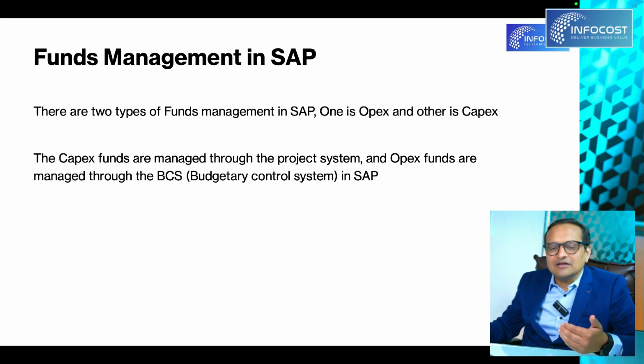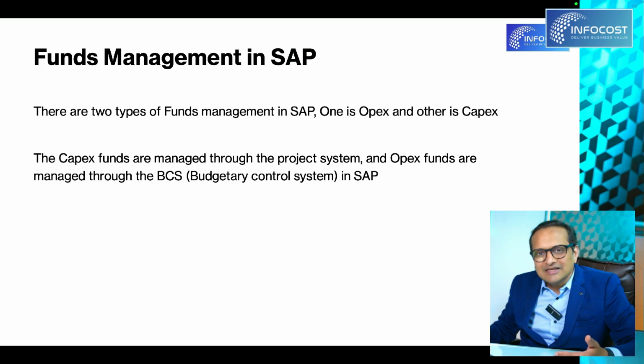There are WBS elements, and in each WBS element we can enter the budget, and according to the budget the control of that expenditure is taken care of, because there is no concept of GL account budgeting in the WBS element. The WBS element captures the budget for the total WBS as a whole. But in CAPEX that is sufficient for us to monitor and maintain.